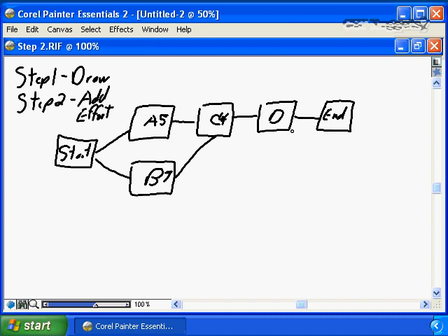And finally, D has an estimate of 3 days to get the job done. Now, again, for simplicity in this network diagram, I'm assuming I have a single resource working full-time days at 100% availability, and saying that resource number 1 is going to work on task A, dedicated, uninterrupted, and is going to get it done with 5 days worth of effort, i.e. 5 days worth of duration.